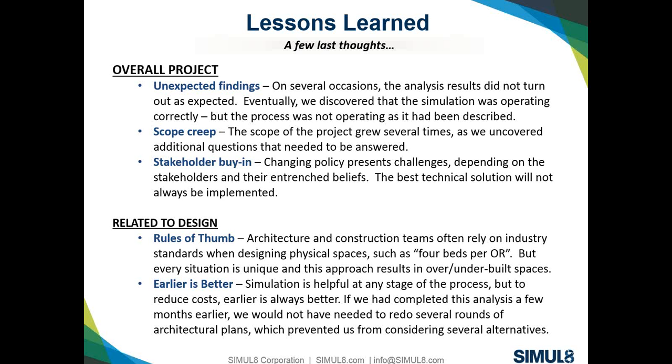So I want to really quickly share a few lessons learned with you. We've talked about some of these already, but from an overall project perspective, sometimes we got results that we didn't expect, and sometimes you have to fix your model or simulation because you had something wired wrong. But eventually, most of those things we discovered were actually the simulation operating correctly, but the process in real life was not operating as it had been described to us.